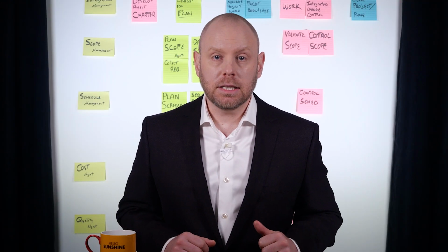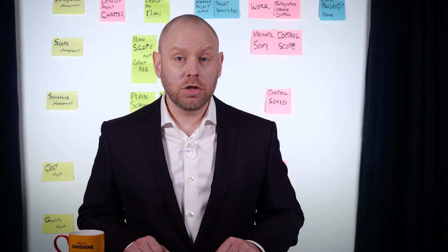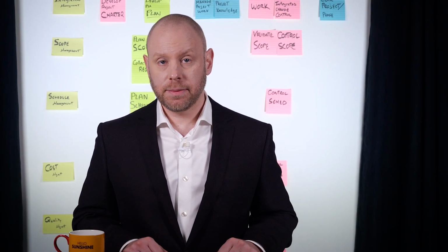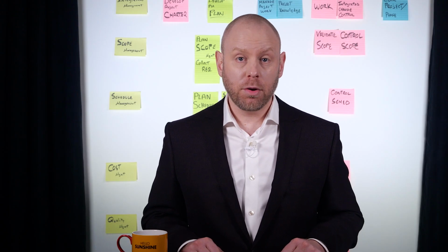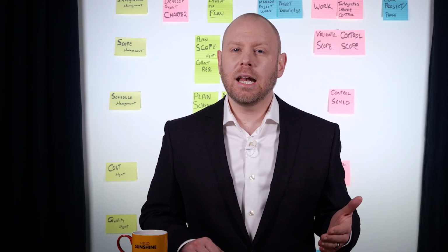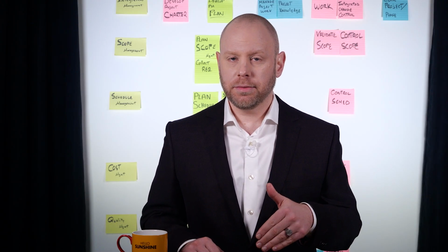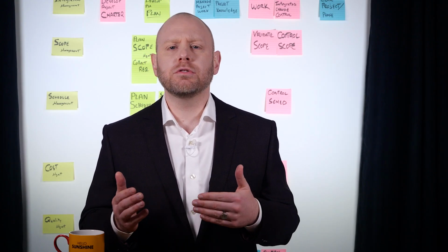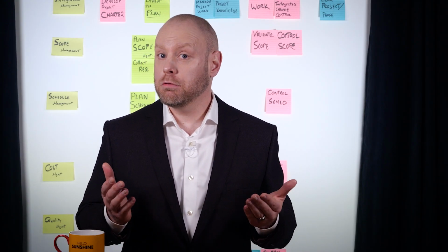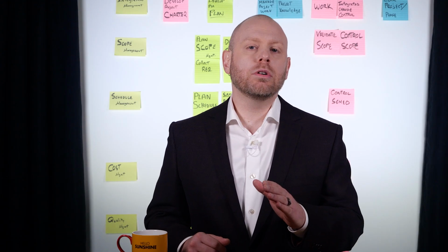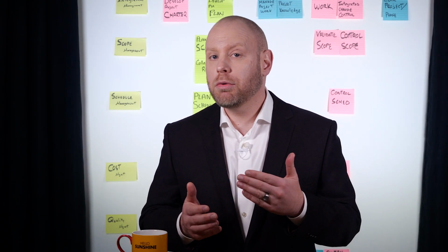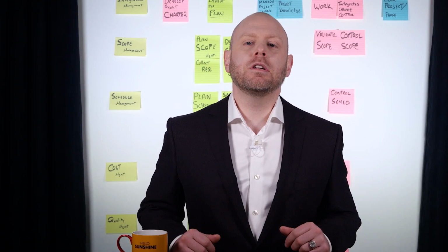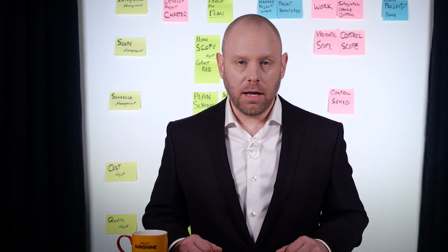Roles and responsibilities. Funding, including contingencies and management reserves. Timing. How often will the risk management process be performed throughout the project, and inclusion into the schedule. Risk categories, common ways to structure risk, perhaps as a risk breakdown structure. Stakeholder risk appetite and or tolerance, shown in key thresholds, and a definition of risk probability and impact.